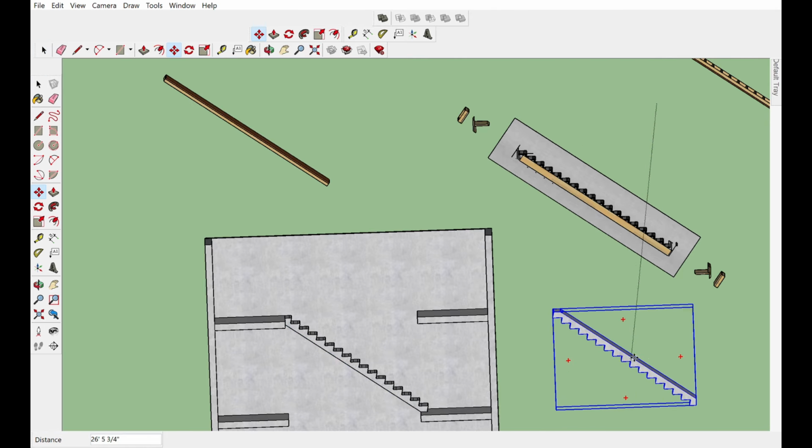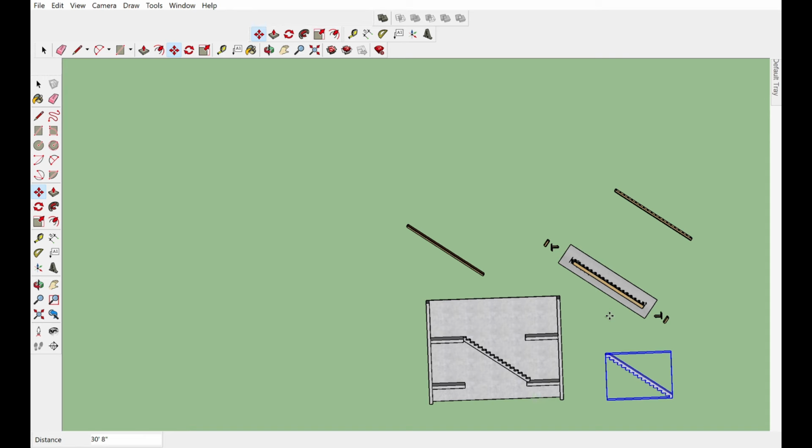Cast on-site precast stairs. The stairs shown are cast on-site using reusable stair formwork, producing precast concrete stair units. Once stripped, the stairs can be staged on-site and lifted into position when required.